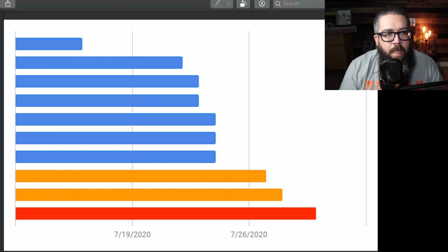Come look at me. So now we know, hey, just by looking at the aging chart very quickly, we can see what the problem is. Why the team's not, quote unquote, burning down their points, burning down their stories. It's because their WIP is high, and they've got in this case 3 stories that have been open a long time. Yes, I colored these. I'm not exactly sure if they represent too long for this team, but I signaled based off of the stuff that had been open longer.